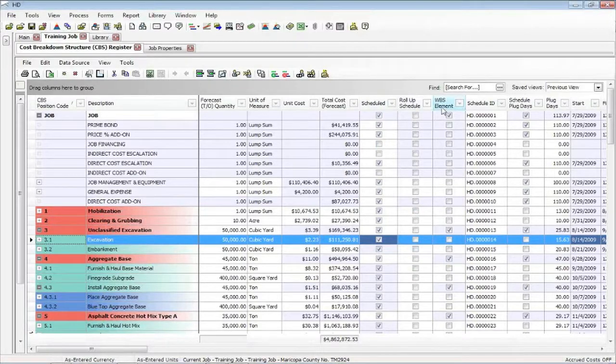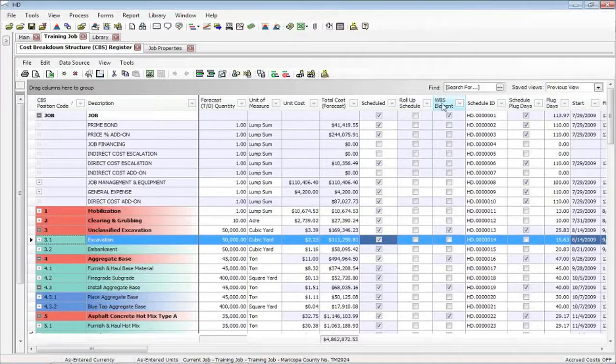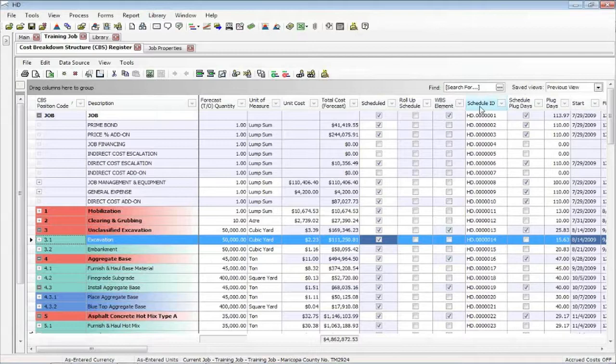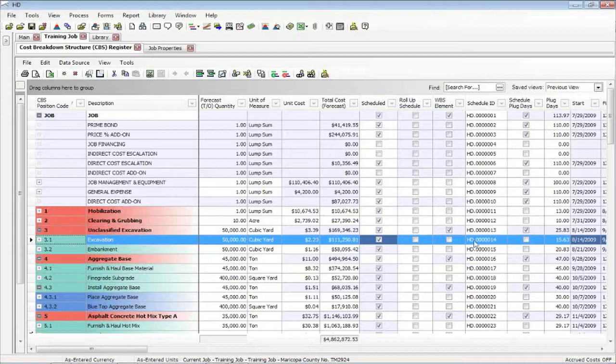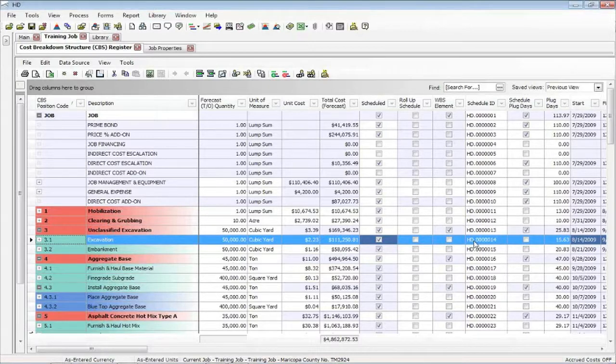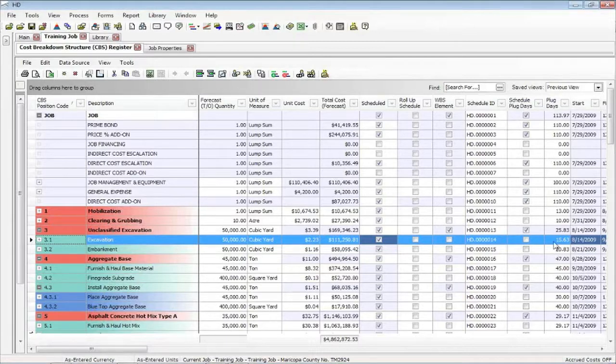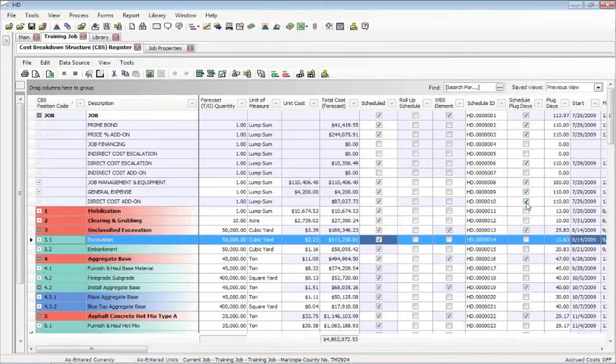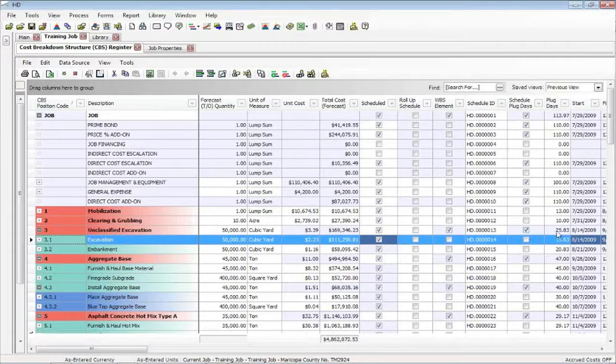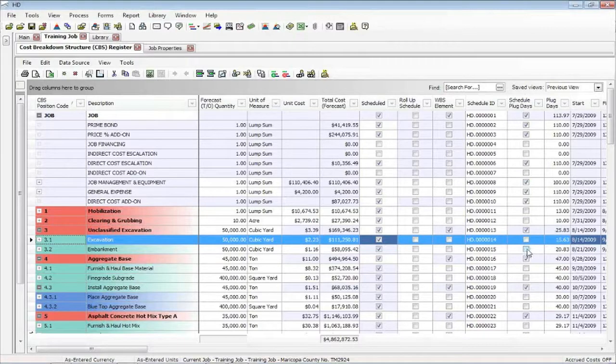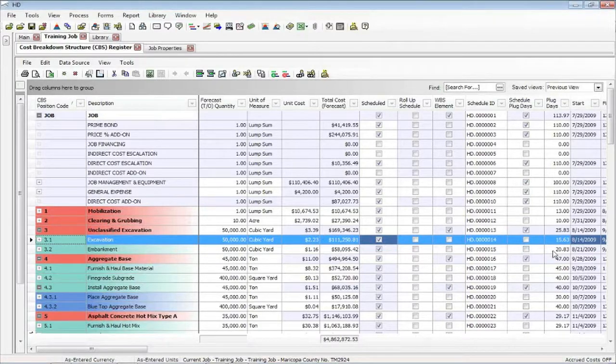What Hard Dollar calls their superior is what Primavera calls their WBS element. So this is strictly information. This is the schedule ID that you may use for ordering Primavera's items. Hard Dollar creates these. You can change these if you want, but it's an alphanumeric field. Plug days are the days that came from the estimate. These check marks allow you to enter a duration that's different than the estimate. So I could decide that I want to use a different duration in Primavera. Click the marks, put my own duration in, and that's what Primavera will use for its duration.